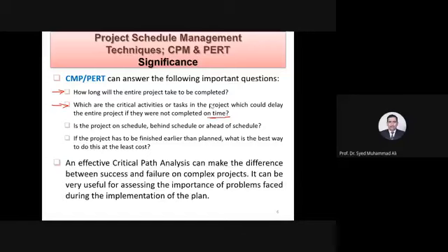It depends upon the size of project. If you're constructing a 5-marla house, the number of activities can be maybe a couple of dozens of activities happening over a period of 6 months or 9 months or 1 year. If you're constructing a bridge, then it might be hundreds of activities happening over a period of maybe 6 months or 1 year. If you're constructing a dam, there might be thousands of activities happening over a period of like 5 years or 6 years. It depends how you have broken down. I just gave you a relative comparison.